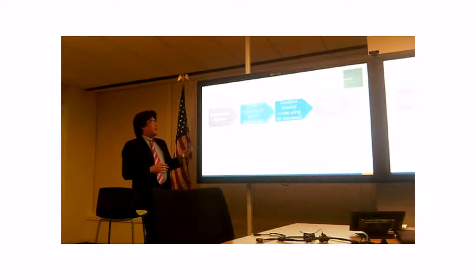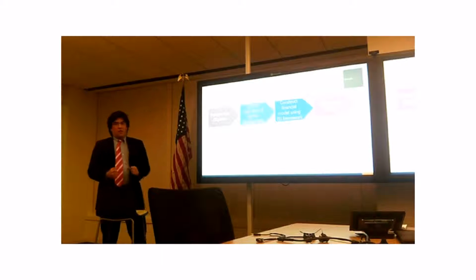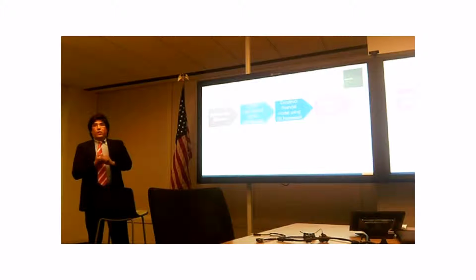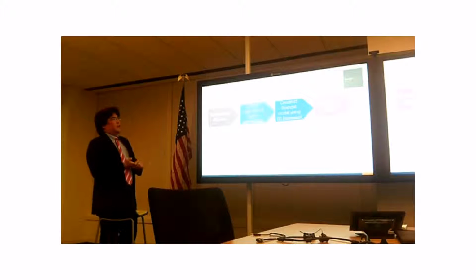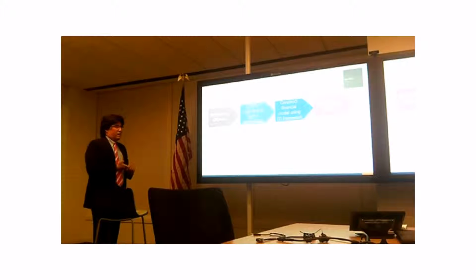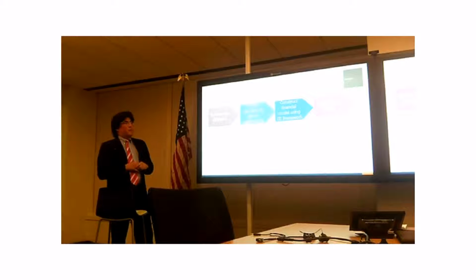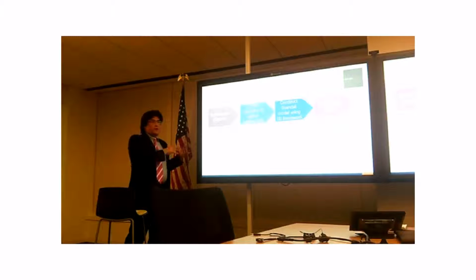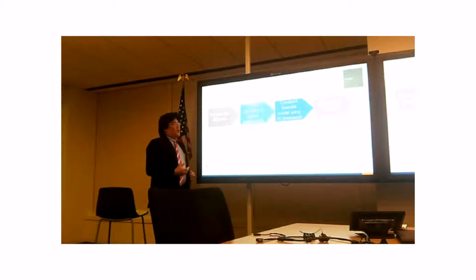And then once you have this information and this background, you can start building your TEI model. So this is, what assumptions do I want to make? What costs do I want to incorporate? What benefits do I want to incorporate? You may come to a point where you say, I know that Lync can give me the benefit of collaboration, but is that something I really want to derive? That seems very daunting, and it doesn't necessarily match my business objectives, because it's kind of like a soft benefit. And so you can choose not to incorporate that, but you can take that into account as part of the qualitative assessment. What you do want to understand is the costs, and what are some of the cost reductions that you may have, which you can interpret as a benefit itself. And then finally, you create a roadmap and you create a case study that supports this.